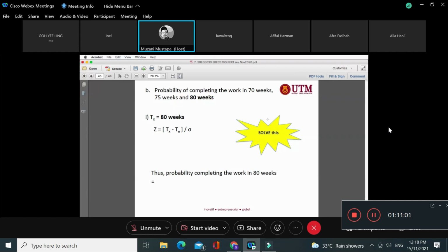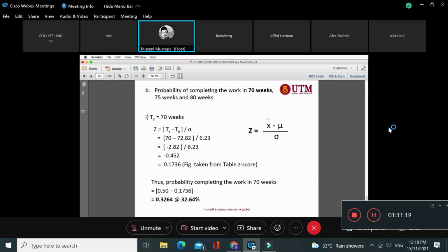So you notice the calculation of PERT, the difference is the three-point estimate, and we still calculate using the critical path duration. We determine the duration, and then we want to know the Z score on the table, the Z area score. This determines the chances or probability of that particular project being completed or not.